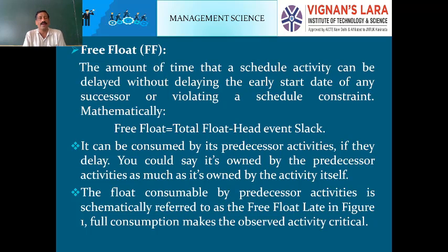Mathematically, it is identified as free float equals total float minus head event slack. I will explain head event slack later. Further, it can be consumed by its preceding activity. If they delay, you could say it is owned by the preceding activity as much as it is owned by the activity itself.